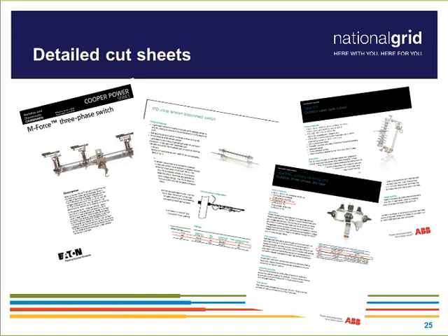And again, those cut sheets are important so we can validate the equipment, and when we review the equipment and then go out there and witness test or field verify, knowing that that equipment matches what we've agreed upon in the design phase, we would approve that, and we would have record of what the equipment is and understand how its functionality is expected to perform.